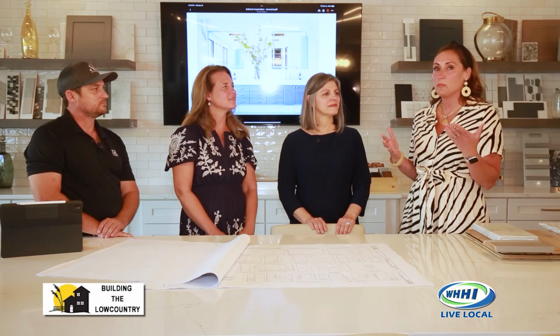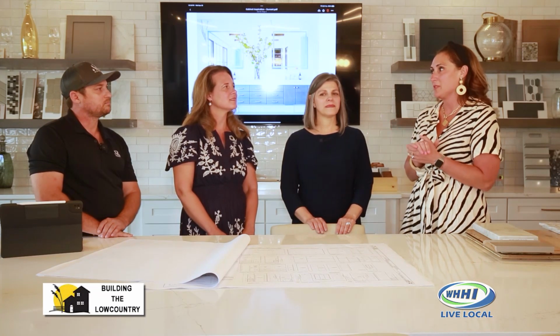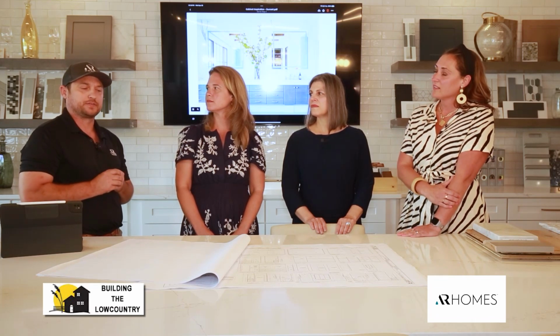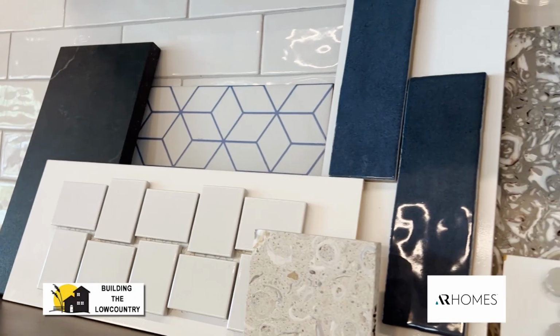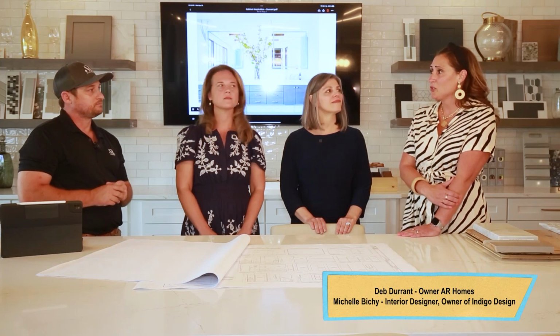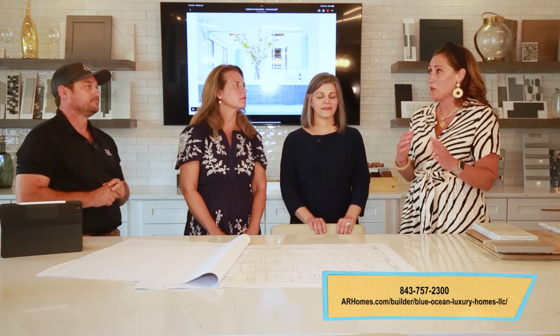So there was the special process with the ARB. I think you talked about being able to save time. What's your process? Yeah, so one of the biggest things we do at the beginning is just get your exterior elevations and a floor plan done up front. And we usually have that done within 3 to 4 weeks of contract. And we are actually going into every ARB with a conceptual vision for our customers to make sure we're on the right track, because getting through the ARBs can be a hurdle sometimes, and knowing that you're on the right track to get through quicker, it's also very much appreciated by all ARBs to come in and ask their opinions as well. And the client too, because you don't have to go back and make changes because you've already figured that out. Which lengthens everything. Exactly. Yes.